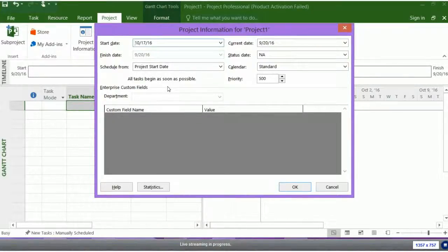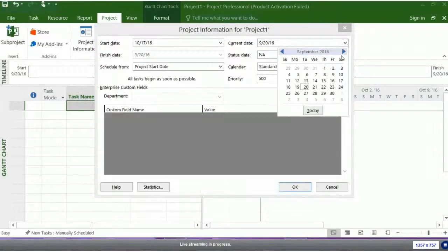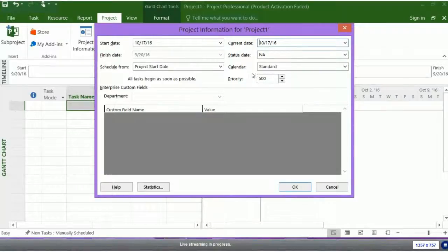If I schedule from the finish, some people like that. You see the finish date is gray here. If I put tasks in, it's going to finish those tasks once it calculates it. So if we were to put this into a future state, and I start putting some tasks in, we would see this finish date start to change. Well, what happens? I can't fix the finish date. It's calculated. Gray things in project are calculated, but I can set a start date.